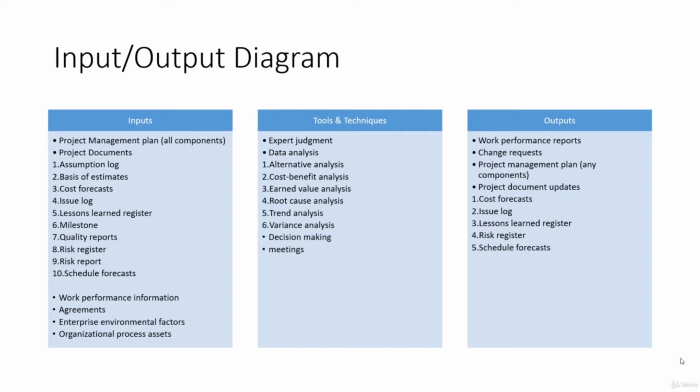Milestone list is basically a list of the important dates. So if you are following, let's say, Scrum, you will have the important dates for the various sprints, their start date, end date, important meetings. If you are using waterfall, you will have the design phase. So let's say on XYZ date you will start the BRD preparation, then it will end on another date, then the detailed design, the solution document will be started, it will end, then the development will start, and so on.